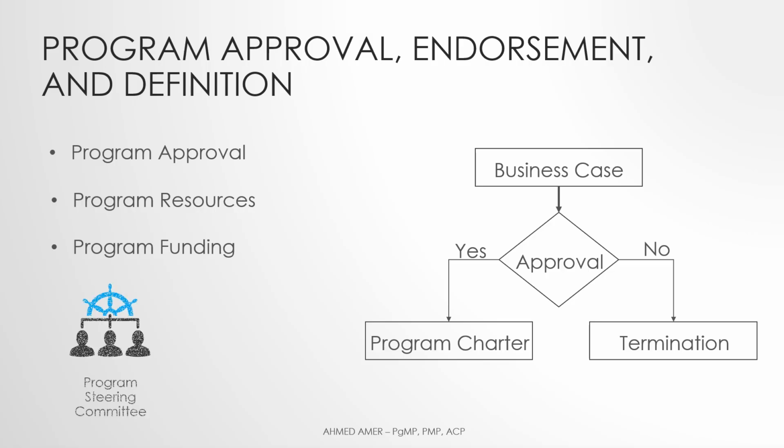Please note that the Program Steering Committee is responsible for securing external funding and entering any necessary agreements to obtain it. It is safe to assume that in similar cases, the funding may have constraints that limit its use due to laws, regulations, or other limitations.